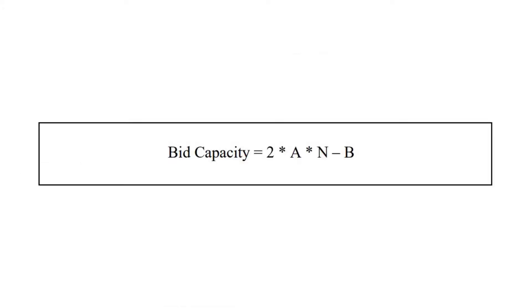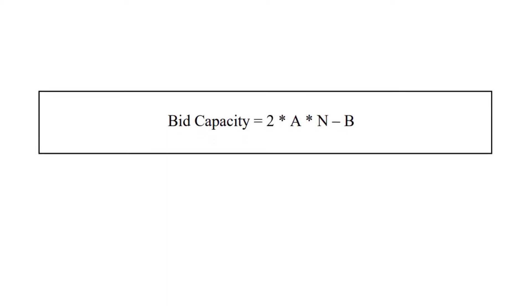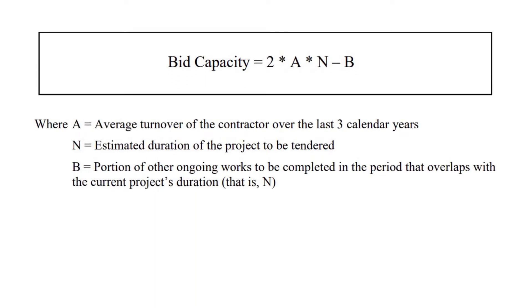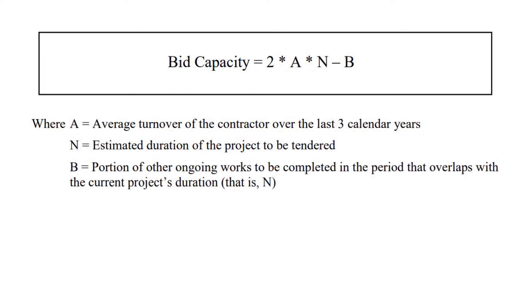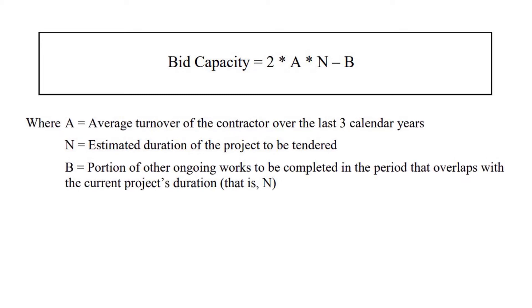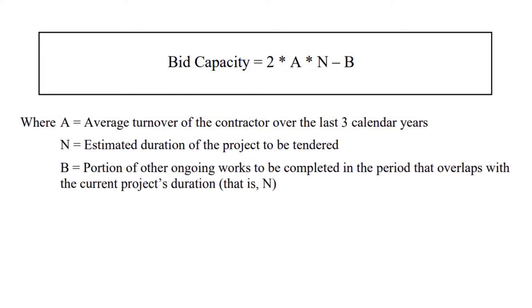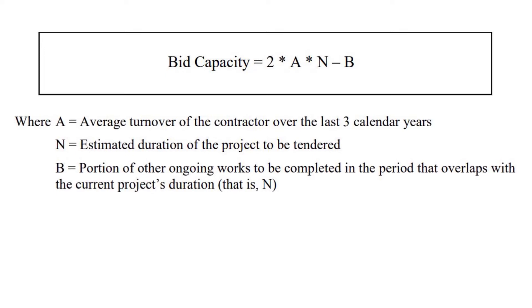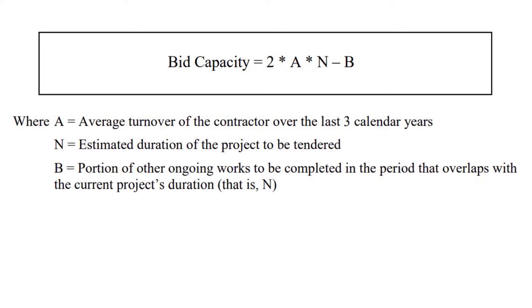This is the formula to calculate the bid capacity of a contractor. Bid capacity equals 2 × A × N − B, where A is the average annual turnover of the contractor in the past three years, N is the estimated duration of the project to be tendered in years, and B is the portion of other ongoing works to be completed in the period that overlaps with the current project's duration.